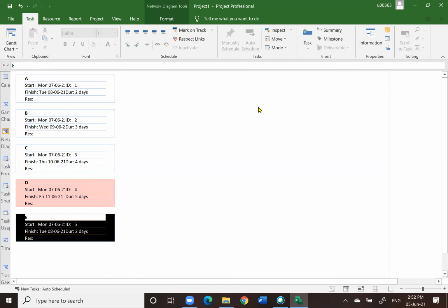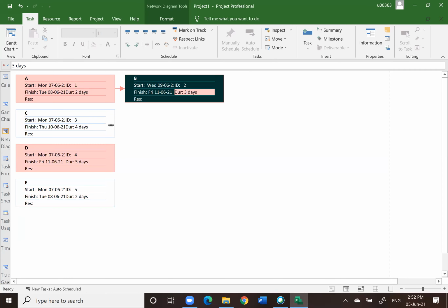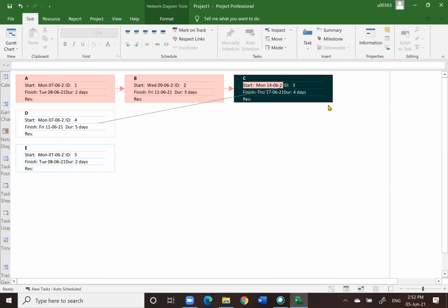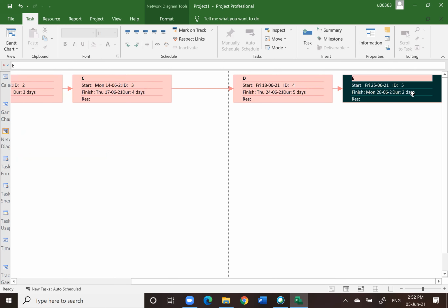So then, if for instance, I choose to work on the network diagram page, I can simply link those activities together, which is much faster. Okay, you see, now I already link. And you notice that the red color box indicates the critical path. Why? Because it is only one path, so all the activities are critical.